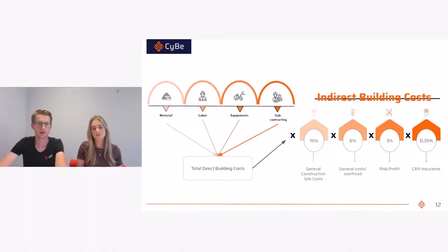After these, we are going to multiply the total number with the car insurance. The car insurance is the construction all-risk insurance, and it insures you against material damages that occur during the construction or assembly of buildings, roads, bridges, or installations. Think about damage caused by fire, storm, or theft, but also damages caused by construction errors, designing errors, or construction faults. A standard property insurance or building liability insurance does not cover the risk of construction activities.